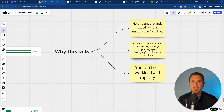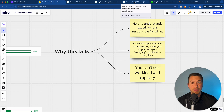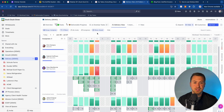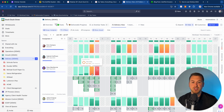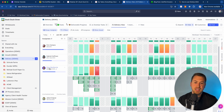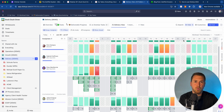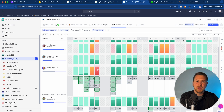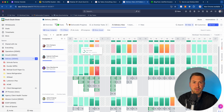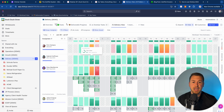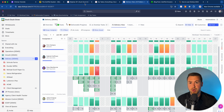In addition to that, you're also going to lose visibility into workload and capacity. The way that workload and capacity works in ClickUp — and really any project management system — is if I have a workload view here, the three elements you need are the due date, the time estimate, which actually fills up this bar here, and then also the assignee. So if I have a task that's assigned to multiple people, that's essentially going to take that time estimate and split it up amongst all these people. And then if I have a start and due date on that task, it's also going to spread out that time estimate. So it's going to be very difficult to know when that work is actually going to happen and when that time estimate needs to be applied in this workload view. You're going to overwhelm or maybe underwhelm some of your team because you're not going to have any visibility into workload at all.